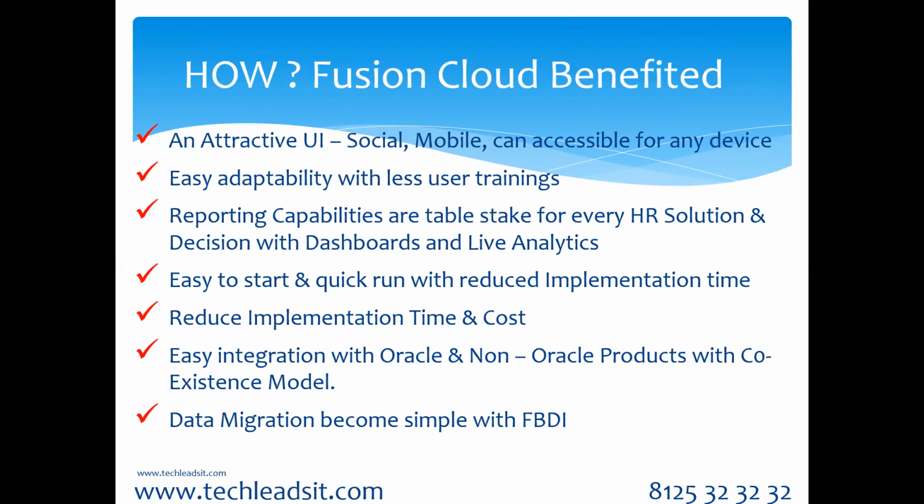Easy to start and quick to run with reduced implementation time. The implementation time, compared to the EBS applications, is definitely going to be reduced, because by the time you kick off your project, your instance is ready. Whereas in our EBS-related application implementations, the project plan consists of, when you say kickoff, that's where you start your DBA work to set up the server and install the application and all those things. So your project plan will consist of those activities also. Here, we don't need those activities as part of our project plan. Once you kick off, you directly start with your requirement gathering activities with the business users. So that's going to reduce the time.